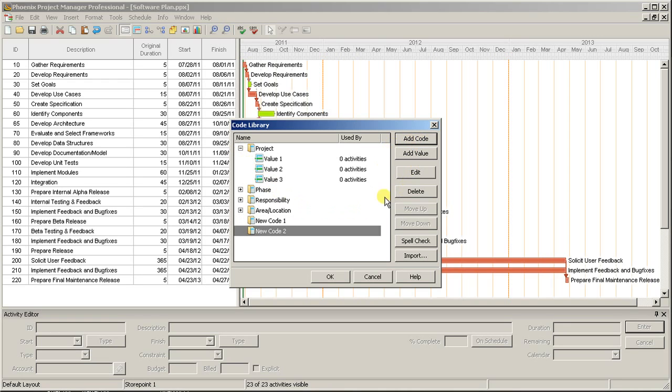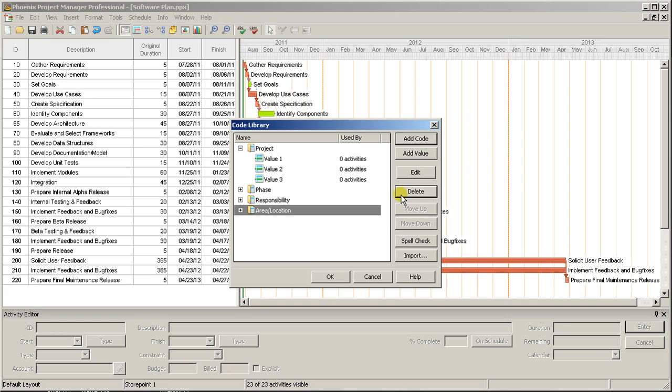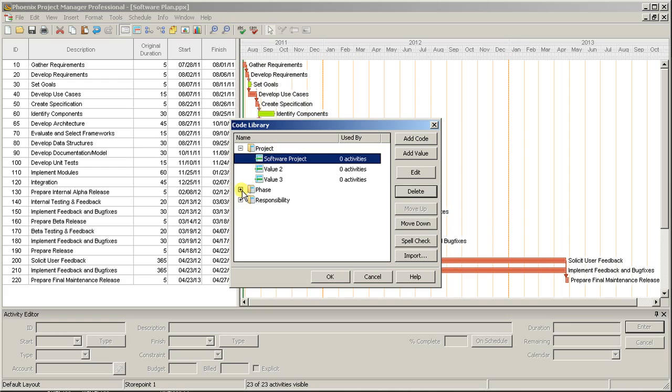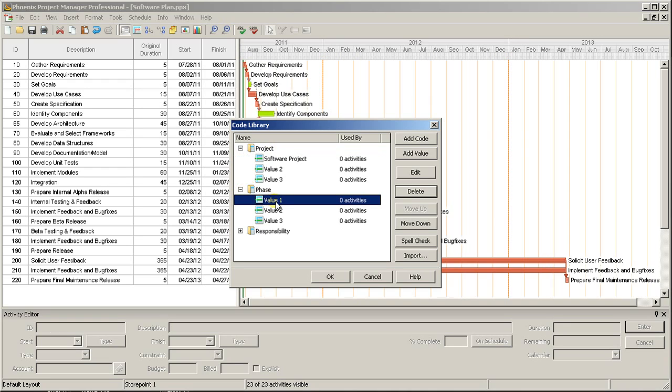For this example, we'll just be using the Project, Phase, and Responsibility codes. To edit the values for a particular code, expand it and then double-click a value or select the value and press Edit. This will enable you to change the value. You can also select and delete any values you no longer need, or add additional ones.